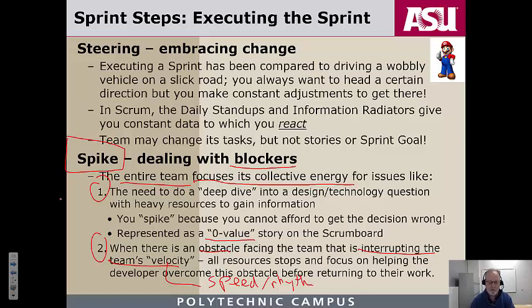Spikes are supposed to be relatively short. Normally, in teams I worked on, they're meant to be really measured in terms of hours, not days even, because your whole sprint is supposed to be short. So it might be the team taking the afternoon and, working together around a bullpen, taking over a conference room, doing what they need to do to move through the blocker. Now, if the blocker goes on 4 days, then you might have to consider more drastic